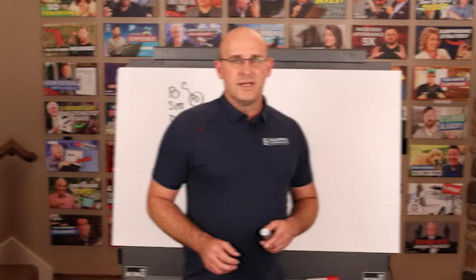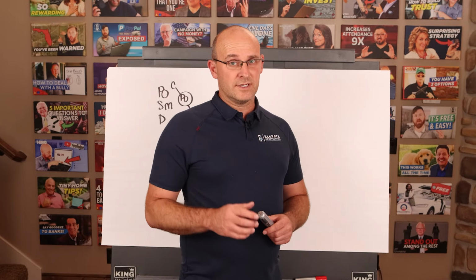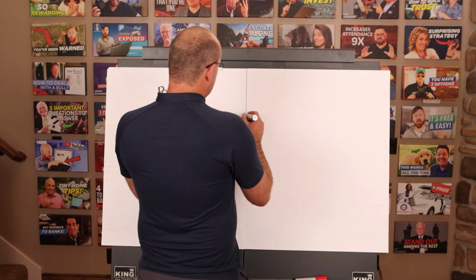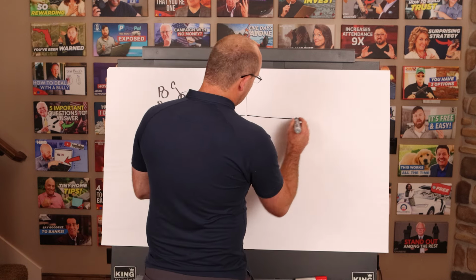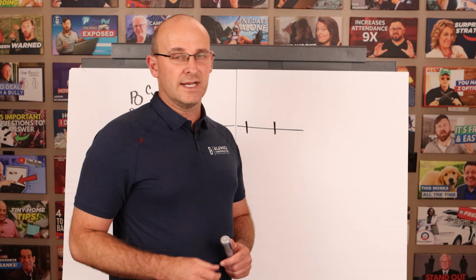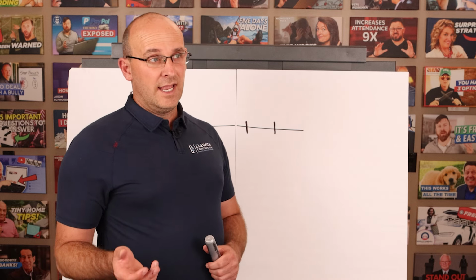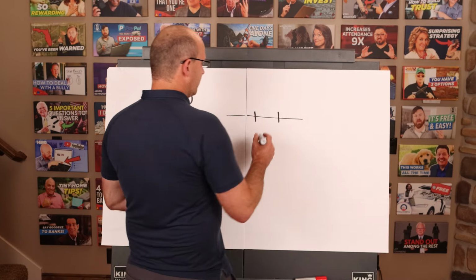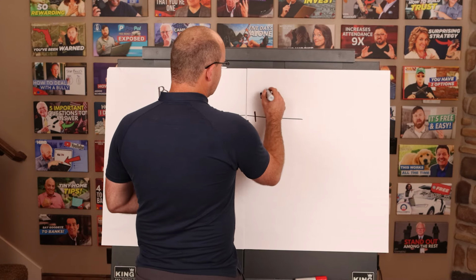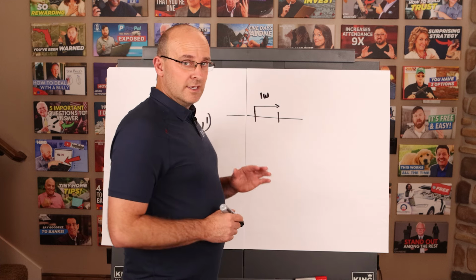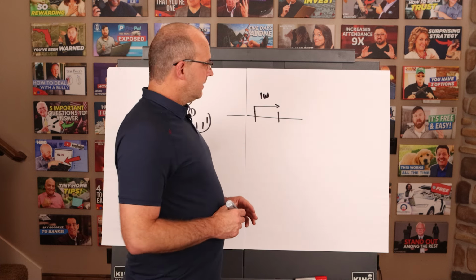Let me move on. There are 5 events that I want to talk about right now. Typically, and this is just how I visualize it in my mind, I typically visualize things in a timeline. So a sprint is a duration of time where you are going to really focus with that team on executing certain tasks. And in construction, I like the 1 week, 2 week, probably a 1 week sprint. So in a weekly work plan. So the sprint, let's say it was 1 week, this sprint is the duration of time that you are tracking. Okay, so that's the first one.